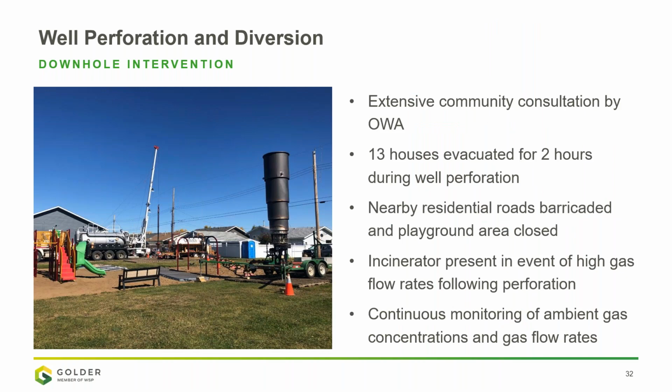So before this program was implemented, there was extensive community consultation by OWA. And I mentioned that specifically for this program, but really throughout OWA's entire work on this well, there's been a lot of community consultation, a lot of information shared with the community. So for this particular program, the 13 houses that were closest to the well were evacuated during the perforation period for about 2 hours.